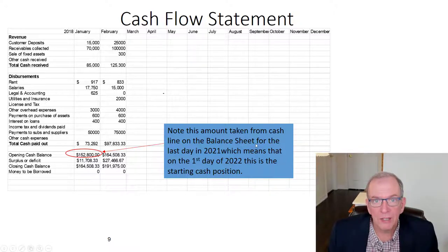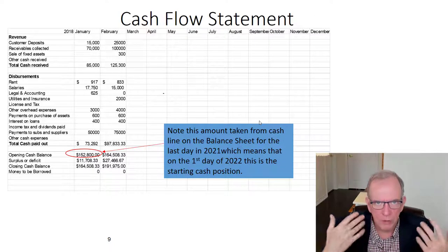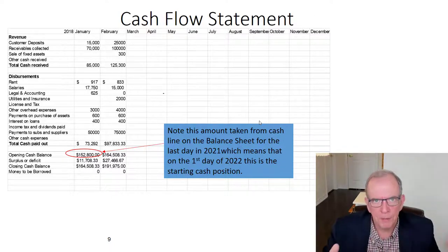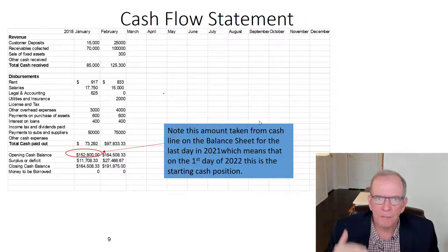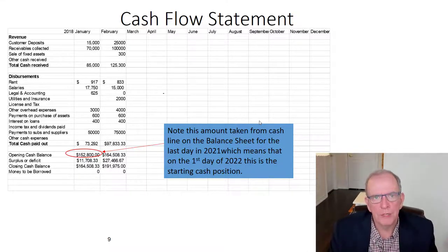You're looking at your cash flow, you're projecting it out. And if six months down the road it looks like you're going to have a shortfall, well, then you can go after the financing today. You can put together the updated business plan. You can talk to your financial advisor, your bank. You can get approval to up your line of credit from 1 million to 1.5 million, whatever that may be. And you're presenting that you have a viable business model. If you're able to do that, and you've got a good reputation and you've been dealing with that bank for a while, it's not too difficult.